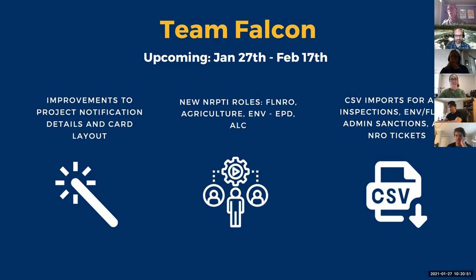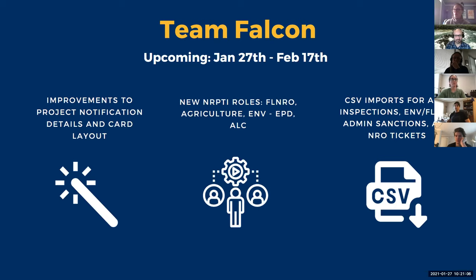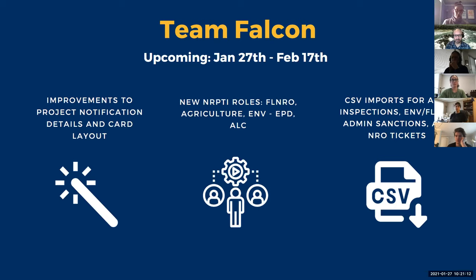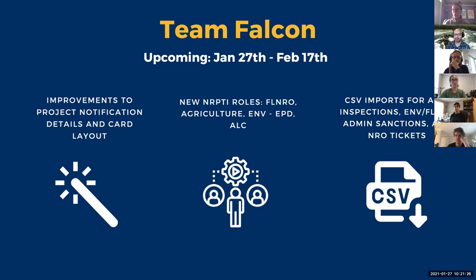And finally, our last goal is going to be to continue with the CSV imports. So that's going to be for the agricultural inspections, the admin sanctions from Ministry of Environment and Flynn Row, and the Natural Resource Officer tickets. So I think as some of the team knows, we're going to be kind of doing two things in parallel. So we're going to be working on these CSV imports to make sure we can get the data into NRPTI for NERCID as well as working on using FME to create a connection between some of these Zone B legacy systems into OpenShift 4. So we're going to do both in parallel just to make sure that we meet our goals and automate it if it's possible.